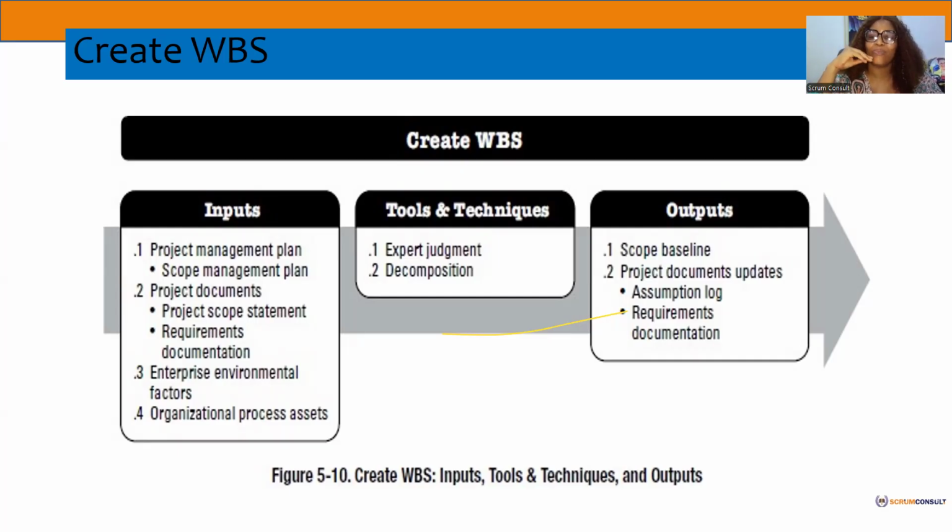For that organization, how is the work breakdown structure created? How is it done? Do you have a template? Do you have an asset? Do you have lessons learned from previous projects? You want to bring them in and see them. If you don't have them, you have to create yours, right? You have your expert judgment. Yes, you need to bring in subject matter expert consultation. And you have your decomposition. We are going to decompose the task now.